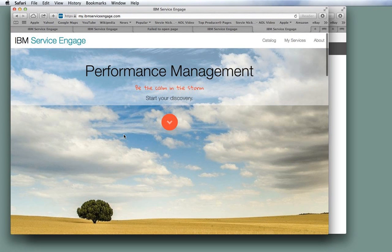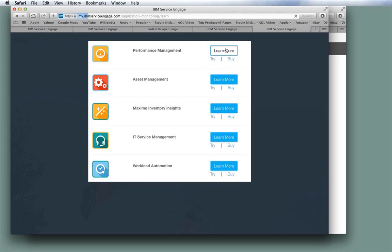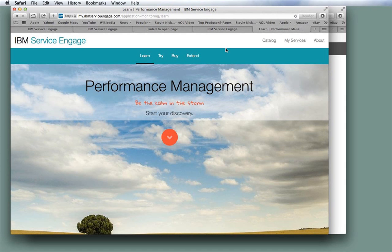We do a thing called the 5 whys, where you ask, all right, so why did this thing happen? Then after that, why did that happen? And then keep going 5 times until you actually get down to the root cause of the problem. Once you come out of that, you have a set of actions that you have to take to make sure that that never happens again. That's something else that's really helped us, so whenever we have those breaking changes, we don't have them again.